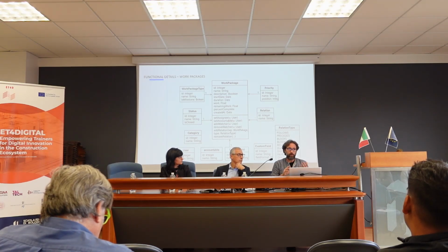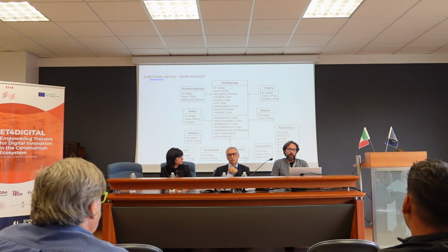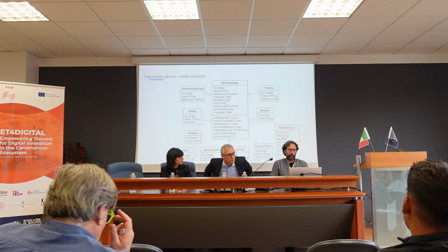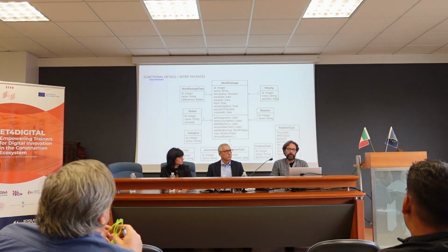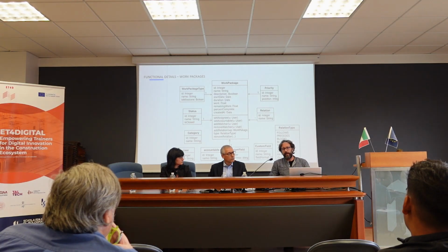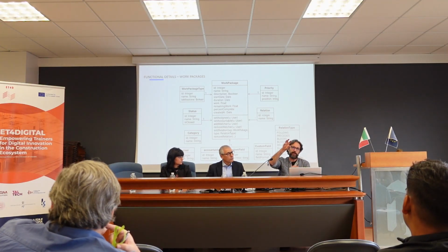We will see tomorrow in the role-play game we are doing. We can set who's accountable for that work package. We can add custom fields, we can add custom work packages to it. And we can set the relation type there is between a work package and another. We can say what is following, what needs to be preceding that work package. We can set a work package parent and child.